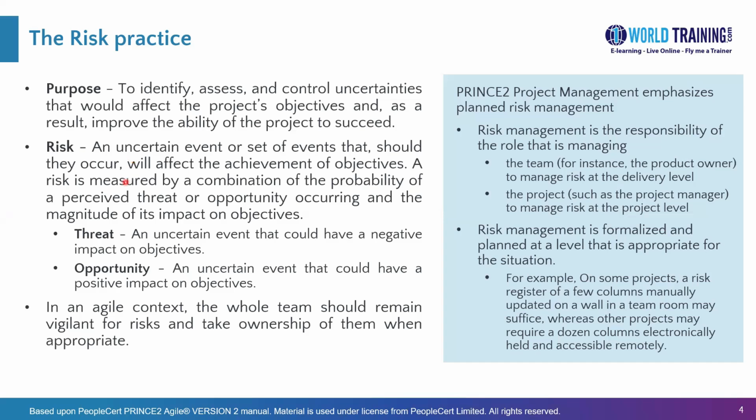Every risk typically has a probability of its occurrence and also the impact as a result of it on the project objectives. There are some other characteristics as well. For example, proximity is another important one. How soon is the risk likely to occur? Typically, the focus is on threats or negative risks, but it is important to also acknowledge the positive ones, which are known as opportunities. For example, there may be an opportunity to cut cost or save time, deliver early, obtain more work based on the better quality of delivery, and so on. And these need to be exploited and enhanced.